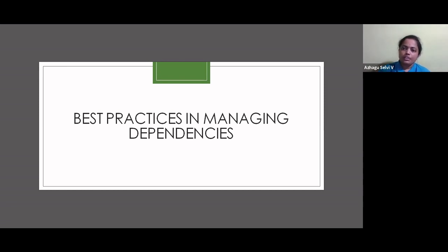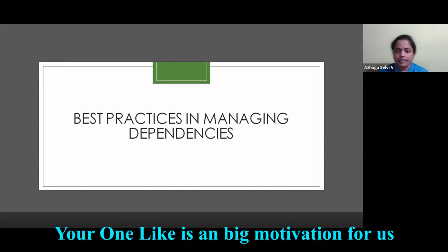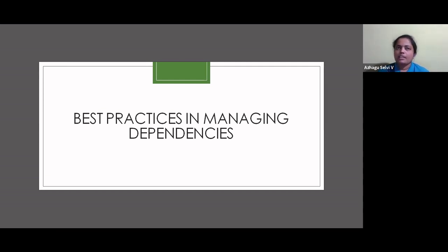So when my application will be ready, for example, at sprint 4 or something, I need to give that kind of heads up to the Scrum Master of the other team, saying that at such and such time we will be ready with the application. If the platform is not ready, what is the other alternative? Because we need end-to-end application testing, end-to-end scenarios to cover on the application: whether we are able to deploy the application, whether we are facing any kind of errors, or what is the time taken during the deployment. These are all the things that we will be checking, but we need a platform.